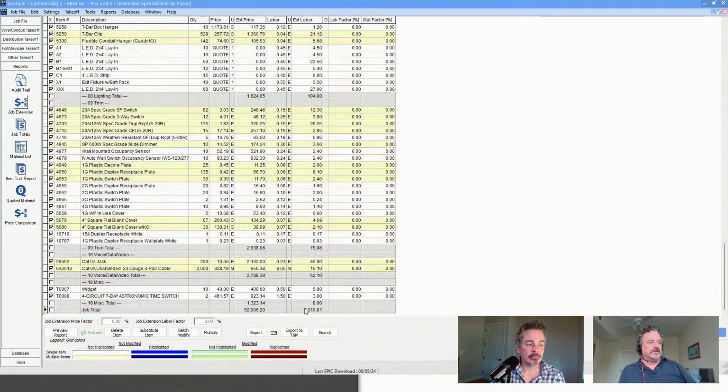But the only way you can track that, so to speak, is if the electricians are reporting their hours at least for the job versus just 8 hours a day. They break it into what job they're working on, and then you can take it a step further and record it by the phase and the cost code.